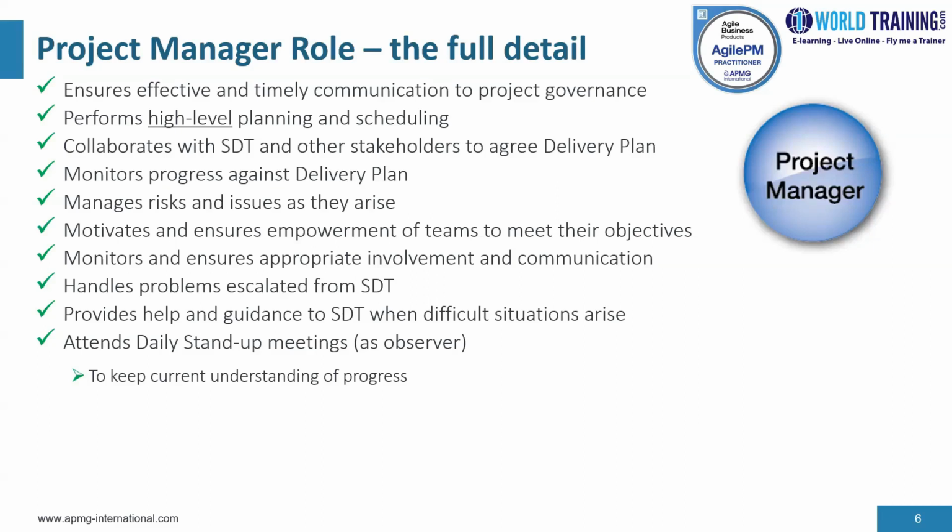And then moving down, the project manager performs high-level project planning and scheduling, but not detailed time box planning or task planning. Moving down, the PM collaborates with the solution development team and other appropriate stakeholders to create and agree the delivery plan. And that's an important responsibility. And further, the project manager monitors progress against the baseline delivery plan.